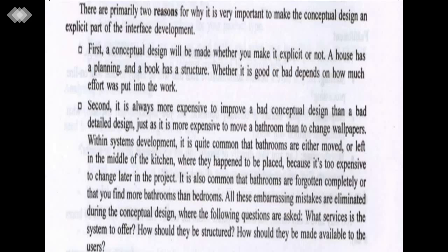Now second, it is always more expensive to improve a bad conceptual design than a bad detailed design, just as it is more expensive to move a bathroom than to change wallpaper. Within system development, it is quite common that bathrooms are either moved or left in the middle of the kitchen, where they happen to be placed, because it is too expensive to change later in the project. It is also common that bathrooms are forgotten completely, or that you find your bathroom inside the bedroom.